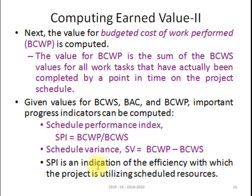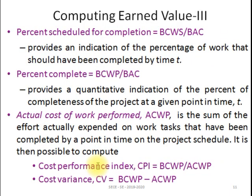SPI is an indication of the efficiency with which the project is utilizing its scheduled resources. If you utilize the scheduled resources properly, you will get an accurate SPI. Next, we calculate the percent scheduled for completion. The percent scheduled for completion is calculated based on BCWS divided by BAC — the Budget at Completion, which is the total summation of all work tasks.